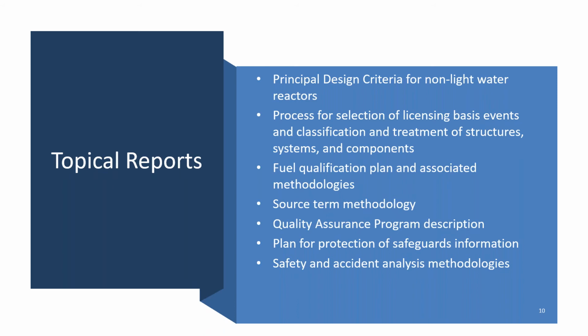For this one, we already have guidance out there for light water reactors in GDC in Appendix A to 10 CFR Part 50. And for non-light water reactors, we provided further guidance in Reg Guide 1.232 that provides guidance on how to develop PDCs and ensure the necessary safety functions and SSCs are covered under the selected PDC.